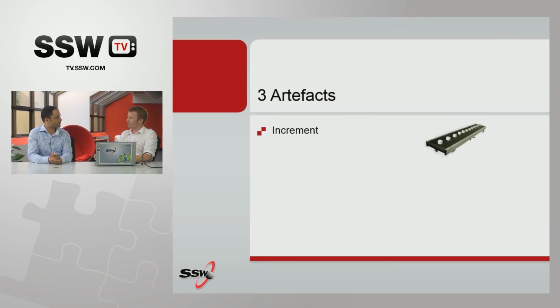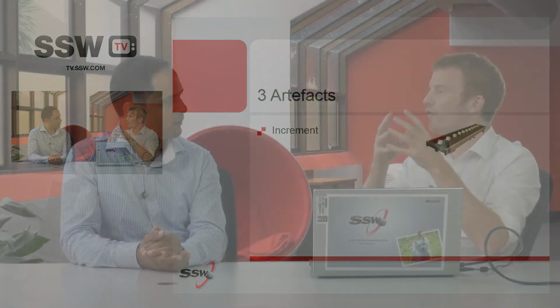One of the pitfalls we get is that teams try to build too much, or too flat a thing. At SSW, what we like to do is build slices. Going back to the baby analogy, we'd rather build a small, fully functioning, fully working piece of functionality. So I'd rather have one fully working piece of functionality than 8 or 9 half-working pieces. I would prefer that the increment was actually fully working and even potentially shippable.